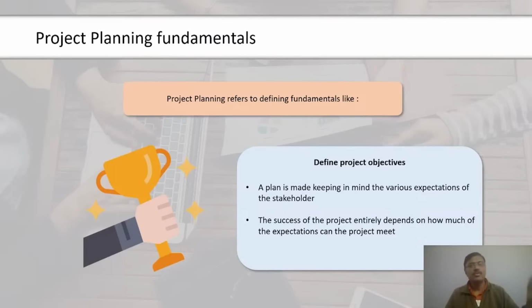Critical path is defined as the longest duration path through a network diagram, which determines the shortest time to complete the project. Float can be considered as a buffer time available to complete an activity. Float is calculated once the network diagram is ready. It is also called as slack. There are 3 kinds of float.